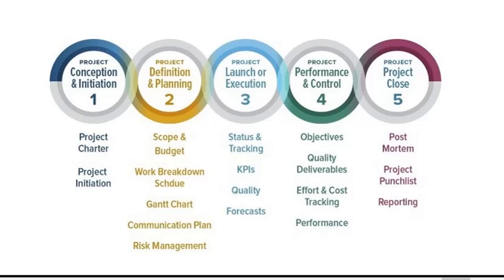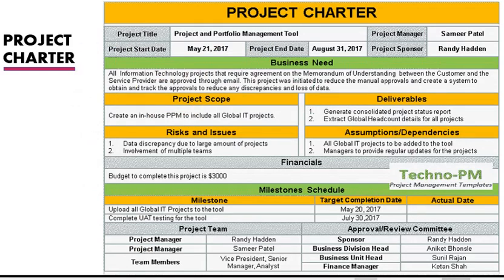So as of now, just for your knowledge, this is how a project charter looks. These are the details that are included in a project charter. It states the project title. It mentions the start date and the end date, a specified time period. Then it mentions the name of the project manager and the project sponsor, that is, who is sponsoring the project. It also specifies the business need.